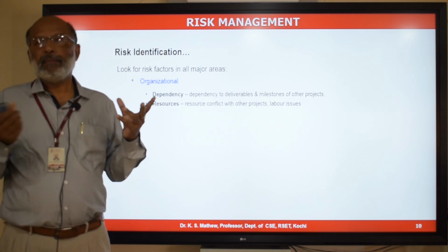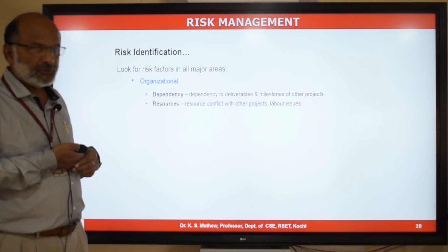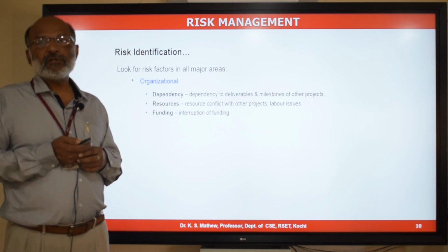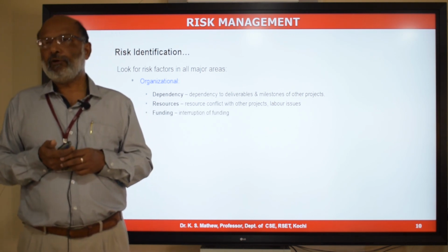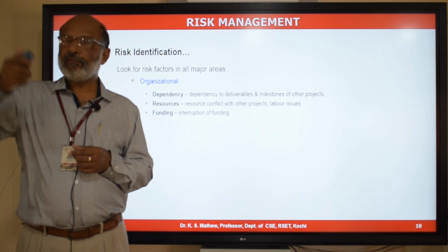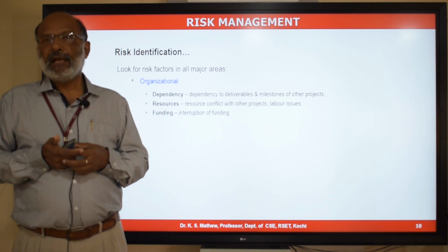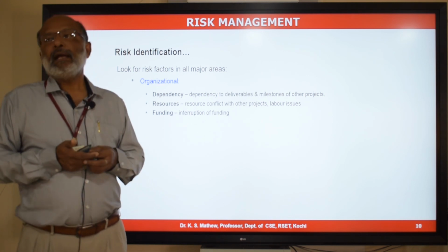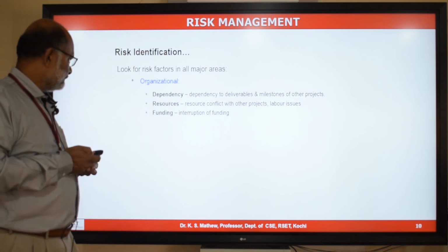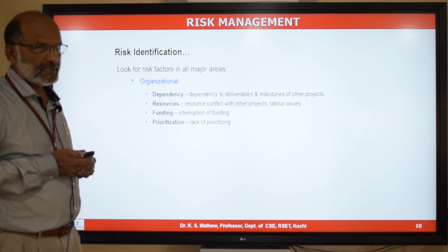So there could be a risk related to conflict of resources in the project. Also there could be labor issues that come in between the project that may also lead to a risk. And funding, interruption of funding or lack of funding or reduction of funding for your project, that may lead to another risk. If there is a change in the top management of the customer organization, they may also have a reprioritization of their project, and your project may be given a low priority, and that may result in interruption of funding or reduction of funding. That will lead to a risk in your project. So lack of prioritization of your project may lead to another risk, which is organizational risk.